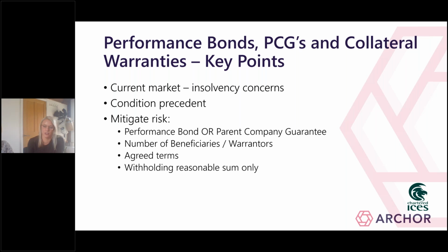And that means the obligation on the main contractor to procure warranties extends to a far greater element of the supply chain than just those subcontractors and consultants with responsibility for a material element of the design, which is the kind of traditional approach. The key issue for the parties responsible for providing these documents is that they are almost always made a condition precedent to payment, and this is particularly problematic when this requires reliance on third parties, which is often the case. So how can a contractor manage this risk?